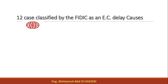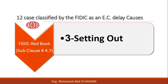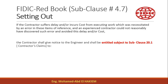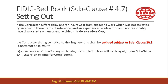Cause 3 – Setting Out. If the contractor suffers delay and/or incurs cost from executing work which was necessitated by an error in these items of reference, and an experienced contractor could not reasonably have discovered such error and avoided this delay and/or cost, the contractor shall give notice to the engineer and shall be entitled subject to subclause 20.1 (Contractors' Claims).